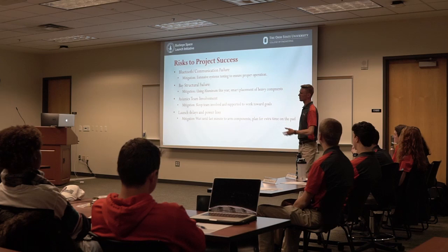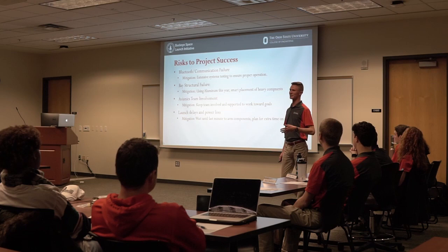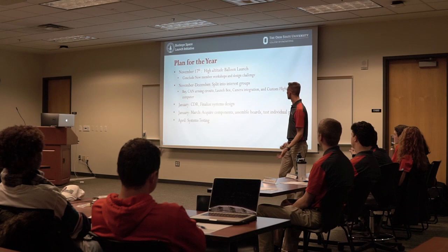So again, trying to wait until the last possible moment to arm components, and then obviously just planning for extra time, like maybe double or triple the amount of time we think we'll need out there, just so that we don't run into that issue.